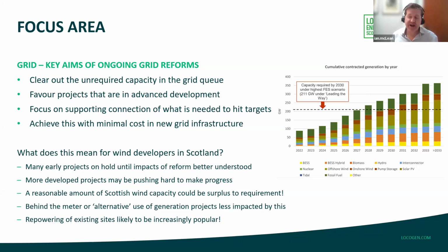Whereas projects that are already well into the development process may be pushing hard to make good progress, because they are aware that at a certain point their progress will be assessed, and how far they have come and how ready they are to be built will dictate what their connection date is, if at all, if actually they receive an updated connection date.